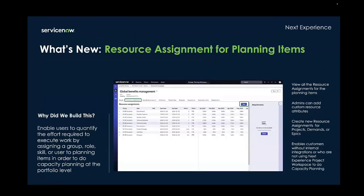To estimate the effort required to complete a planning item, users can now make resource assignments for planning items within the strategic planning workspace or portfolio planning workspace. Resource assignments that are made to demands or projects within the project workspace will also be carried over to the planning workspace. Resource assignments can be assigned to a user, group, role, or skill.